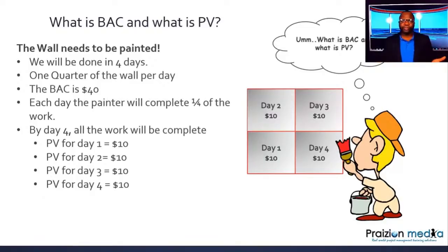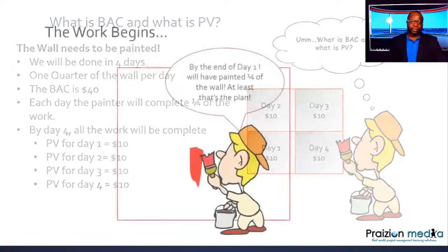That would be improper earned value speak. The proper speak for time phases is planned value. Now, except someone is trying to throw you off or they don't really understand earned value properly, BAC is BAC. Don't tell me BAC for day 1. Tell me BAC for the entire project. Tell me PV for time periods. Does that make sense? Okay.